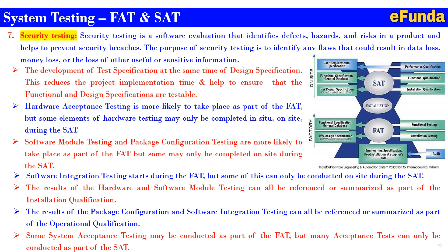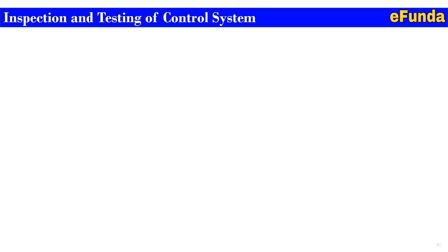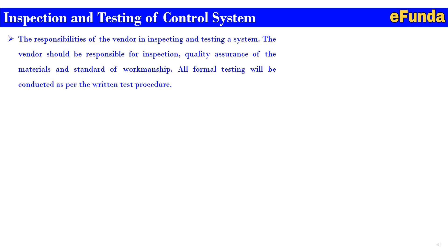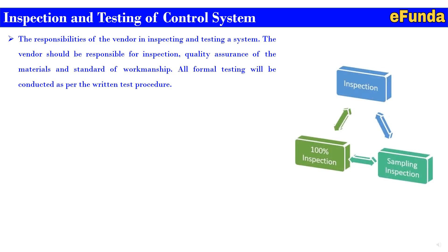Now moving on to inspection and testing of the control system. For better understanding, we will see a simplified version of this inspection and testing. The responsibilities of the vendor in inspecting and testing a system — one can refer to the figure where inspection, 100% inspection, and sample inspection are parts of the inspection. The vendor should be responsible for inspection, quality assurance of material and standard of workmanship. All formal testing will be conducted as per the written test procedure.